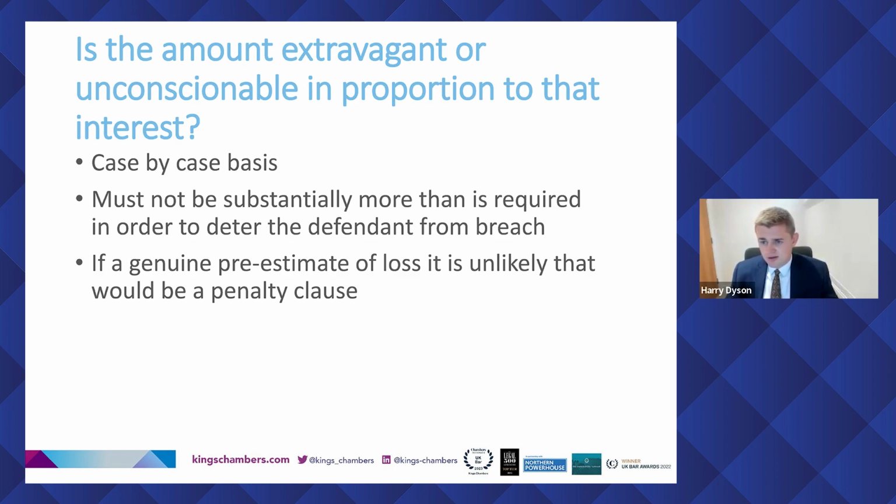deter the defendant's breach. So again, if we think back to the Parking Eye case, £85 isn't really substantially more than is required, because all of us would wince at receiving an £85 penalty fee through the post, whereas if it, for example, was £500, we may well keel over. That's quite different. So that's a good way to think about it.